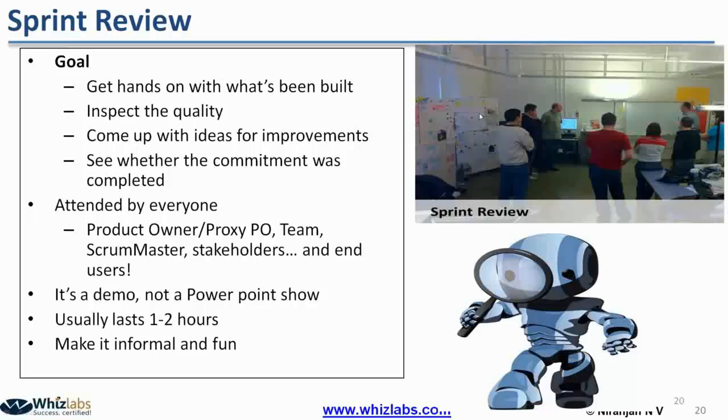They can say that one of the activities is unit testing should be done, code has to be reviewed and comments closed, and another item could be no showstoppers. At least 90% of acceptance criteria should be tested. If they write these and paste them on the board, the team will have visibility of the things that should be taken care of during the sprint. Is that clear, Jayanti?